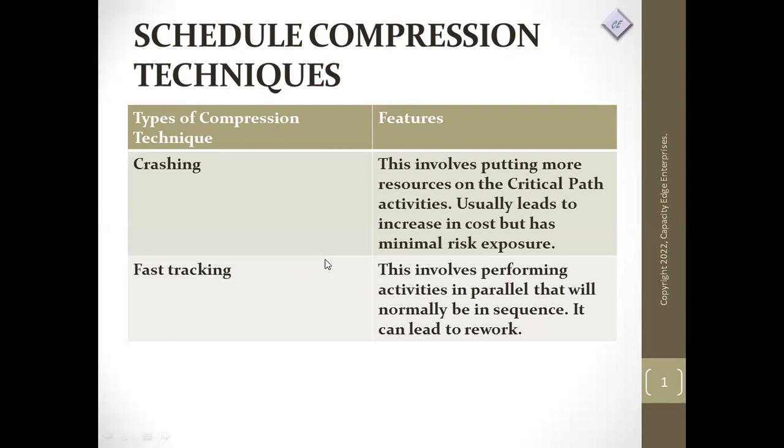So the issue with fast tracking is even though it might not initially lead to high cost, it can lead to rework because if there are now issues with the functionalities of the software as discovered by the user, we will now have to do some things all over again, some coding, some debugging all over again. So that is the issue with fast tracking.